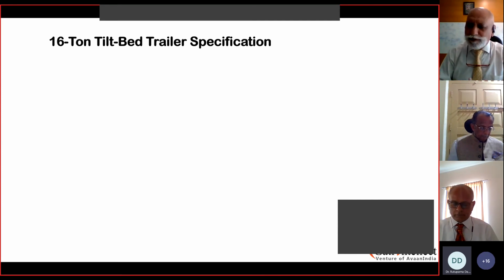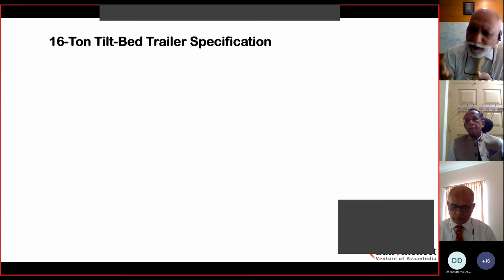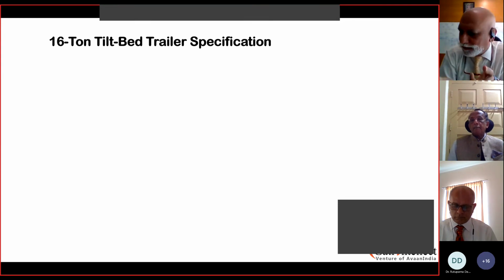Number one. Number two, if the weight factors and dimensions are defined, we also define what wheelbase of the trailer is required and how many axle weights are required. All these technical parameters will ensure that the equipment is not overloaded and that the center of gravity is well aligned. It will also ensure that clear lashing points are given, showing how the equipment has to be lashed to the trailer so that it is stable when transporting. These are a few points which are very critical to be specified by the contractor when he is releasing the tender to the vendor to participate in the tender.